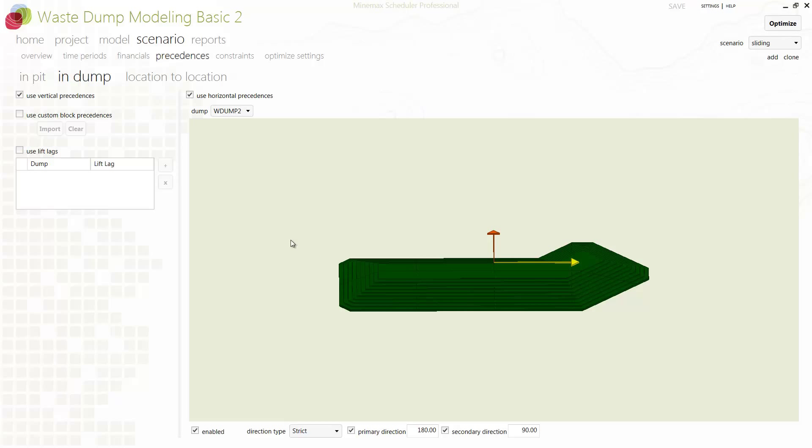Then we define the practical logic of how the dump may be built in terms of vertical and horizontal progression. Vertical precedents can be enforced and lag added to individual lifts. Horizontal precedents can be quickly added by selecting a primary and secondary direction to tell the scheduler how to build the dump.